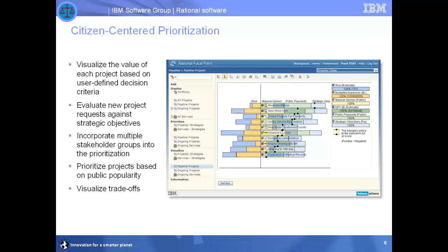I've leveraged business case data into the budgeted expenses and the NPV criteria located in the upper right corner. I've also included a number of subjective criteria such as public popularity, which can be assessed using a pairwise comparison. Using the scoring from each criterion, I can make a decision about which potential projects are the best candidates for launch based on current budget constraints. From that point, I can use the Gantt chart to schedule my projects based on dependencies and resource bottlenecks.